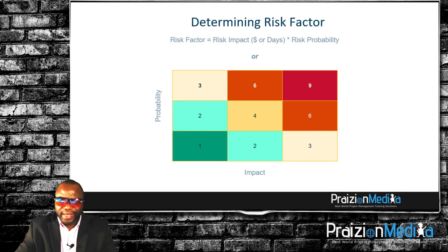And if there's a high level of impact in terms of if a risk associated with that backlog item happens, the impact would be high or the probability would be high, then we could score it, for example, as a 9. Now, this is a dumbed down, simplified version of the typical probability impact matrix. In the world of Agile, we don't go as far in many instances, so this is scaled down. Some matrices go all the way up to 25. This is all the way up to a 9, which is still okay. We can still do what we need to do.